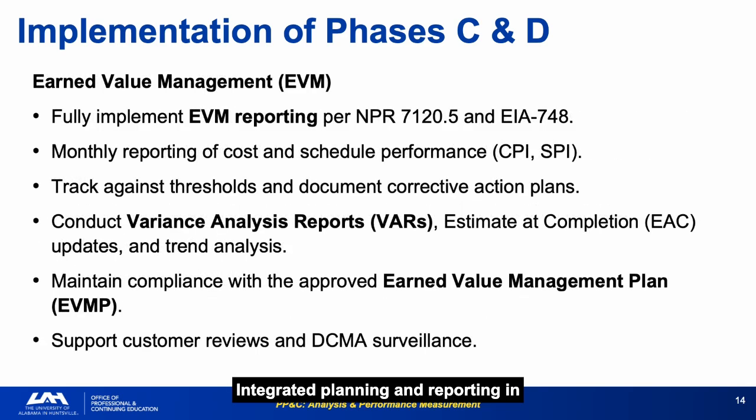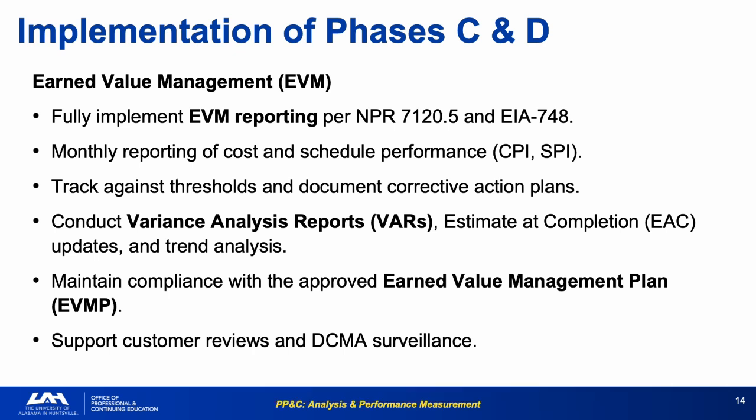Integrated planning and reporting in phases C and D. Maintaining the PMB, supporting major reviews, providing analysis books, and early warning system products. The analysis book integrates cost, schedule, risk, and workforce data into a single view. It is the flagship PPNC product for leadership briefings.